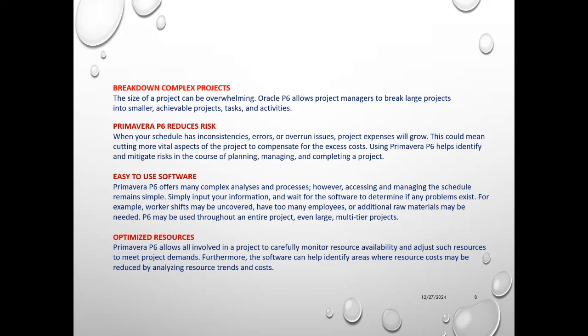But when you come to a schedule, the dates of all the activities you agreed internally before you submit to an external stakeholder, maybe a client, you may find the resource allocation. The project manager may say, show me the resource allocation for the overall project, category-wise resource, and each individual resource. Remember, when we talk about the resource, we are not only talking about manpower, we are talking about material, manpower, and machinery. We are talking about three resources. So basically it's the 3M: manpower, material, and machinery.